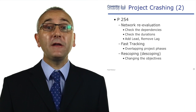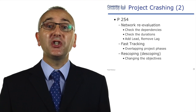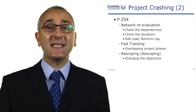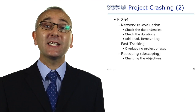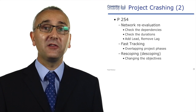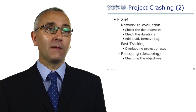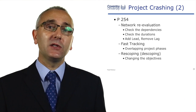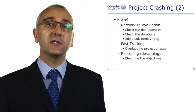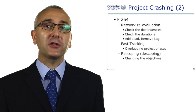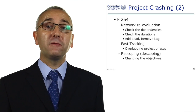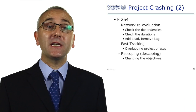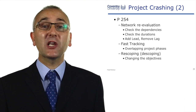Gardner then says re-evaluate your network, check the dependencies, challenge the estimates for the tasks, add lead time, remove the lag time. Overlapping project phases — getting the manufacturing people starting work before the design is completed, similar to what Newton suggests. Finally, Gardner suggests re-scoping the project.